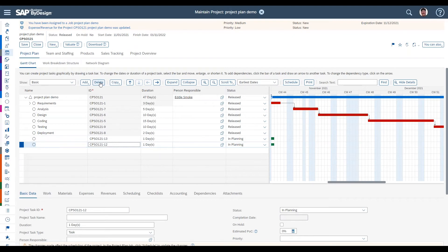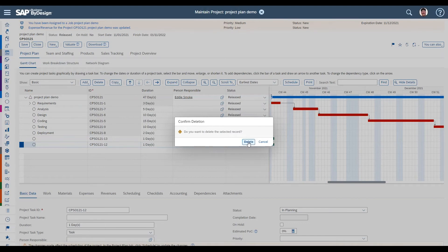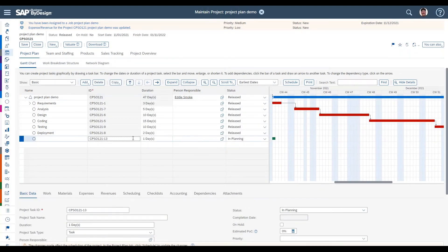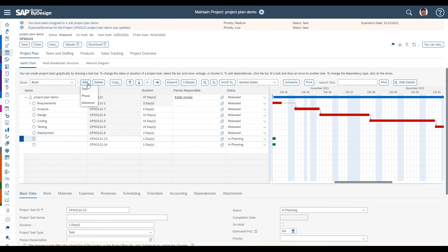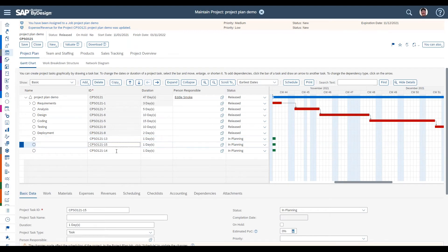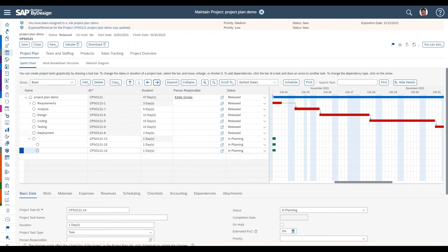For deletion, it's simple — select the task you want to remove and delete it; you'll get a confirmation dialog. For moving tasks up and down in the hierarchy, to make tasks 14 and 15 subtasks of task 13, just select the task and use the indent button. You can also outdent if you've made a mistake. Playing with these buttons you'll get used to how to move and arrange tasks as needed.